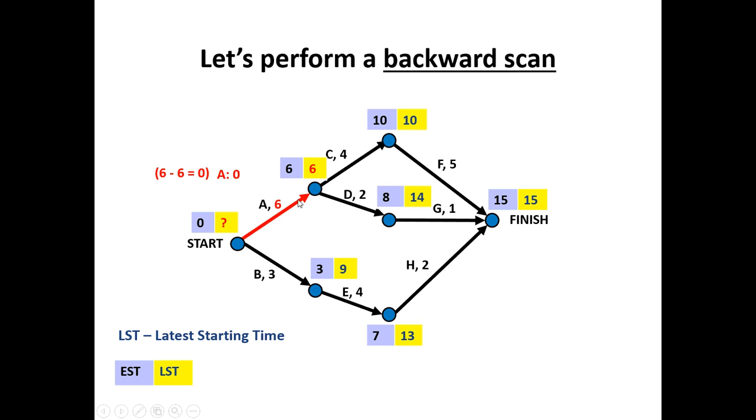Last couple, we've got six minus six gives me zero if I take activity A, scanning backwards. But also I have activity B to consider. And it has a nine, take three, would give me six. Take the smaller of the option, which is zero. So we now have completed a forward and a backwards scan.